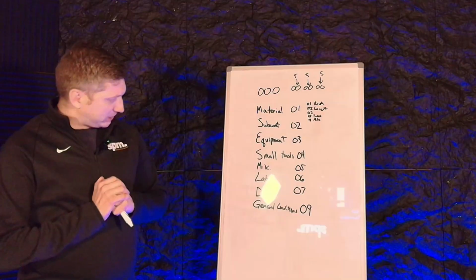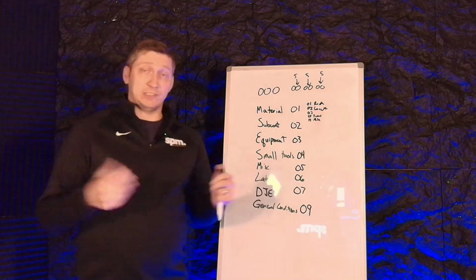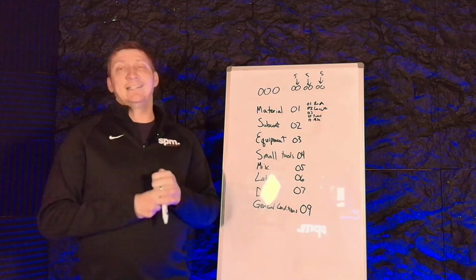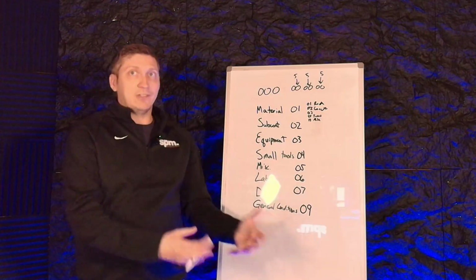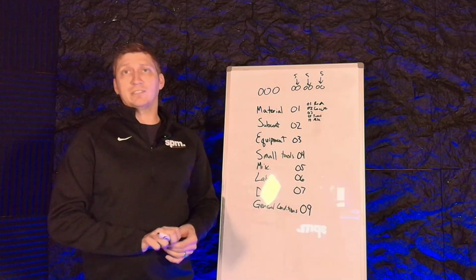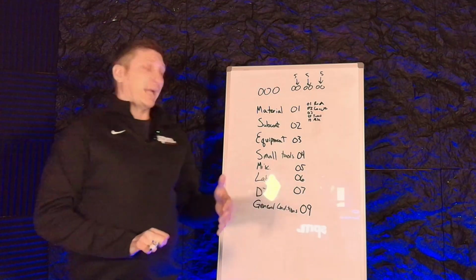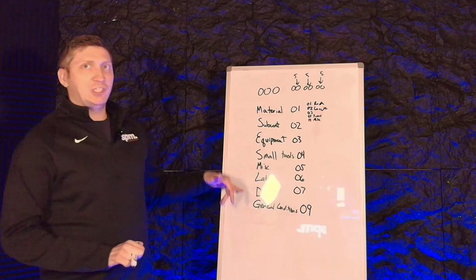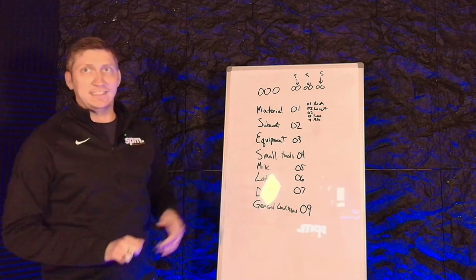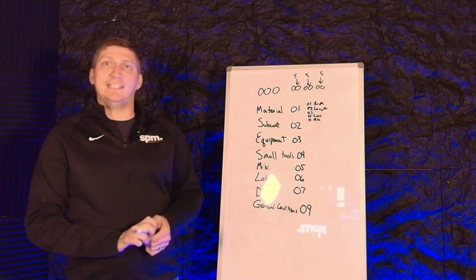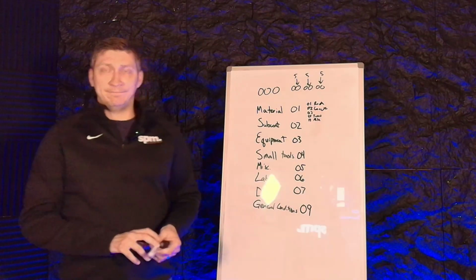What other sections do I have in there? Job trailers, Connexes. These are things that are needed to do the job. I need to store my material, possibly. Maybe I thought I was going to, but I could do it in the building. But I have to pay for them. But the general contractor is not going to pay me to build these things or to have this on site. It's more something I put in my bid, the way I do business.